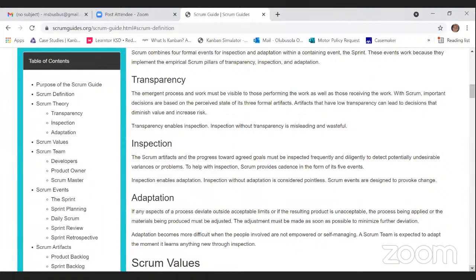Now, because we want to work on the cover of the pen, we pick tasks from the product backlog in relation to the cover of the pen. Developers do that, to pick tasks, and then we discuss, this is the sprint goal. The sprint goal is the cover of the pen, and then we discuss how we're going to achieve the